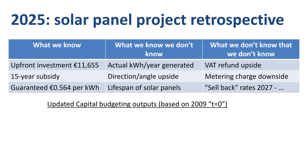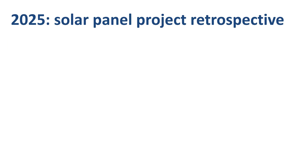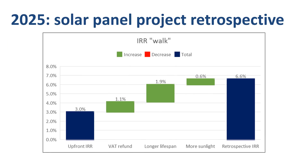Based on all of the above, I recalculated my project economics based on what I know today, translated back to 2009 equivalents at the time of the original investment. The payback period improved from 12 years to 10 years. NPV turns out to be around €4,100 using the same very low 3% discount rate as the original calculations. IRR has doubled to 6.5%, up from just over 3% originally. If presenting this in a company setting, I would show a beautiful IRR walk graph with only greens and no reds.